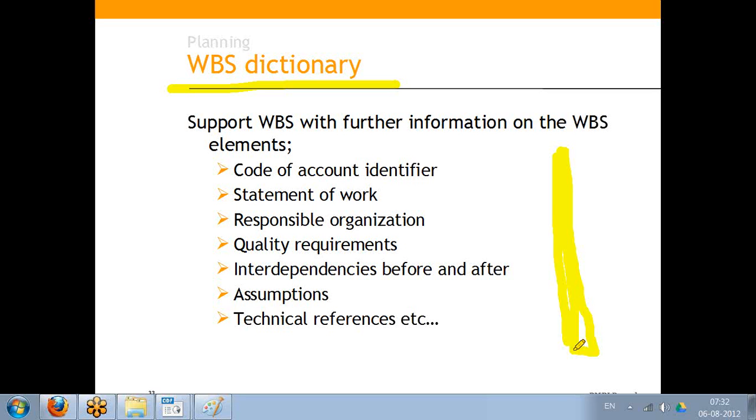Because you're not on site, you are sitting somewhere else, and if you want to ask somebody to paint a wall of a room in that building, you'll have to tell him which floor, which room, which wall, how many coats of paint, what color, what should be the room temperature. Before painting, check whether the plumbers have completed their work. Before starting painting, please check whether the carpeting guys have done their work. In case carpeting is already done, then take some precautionary measures.